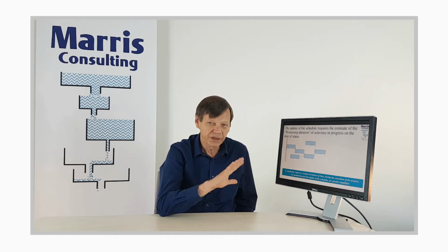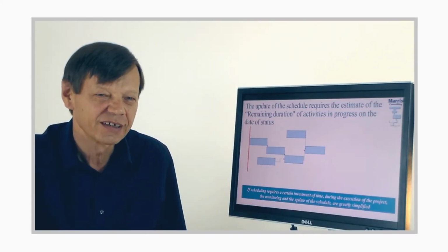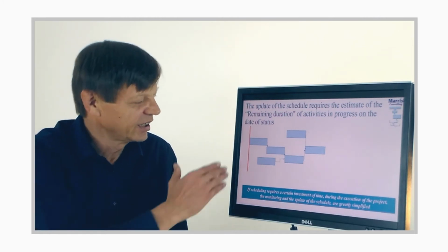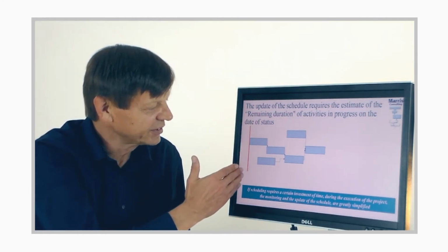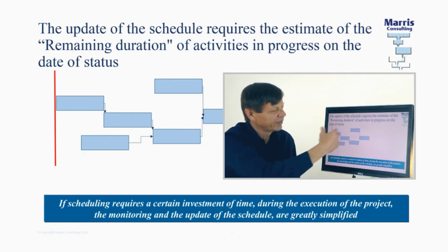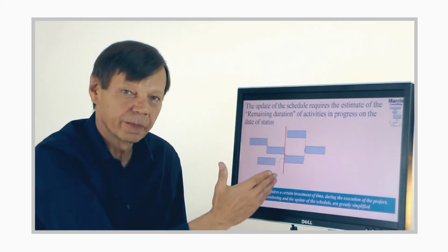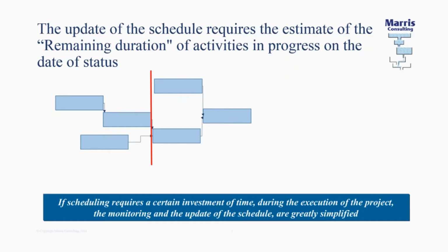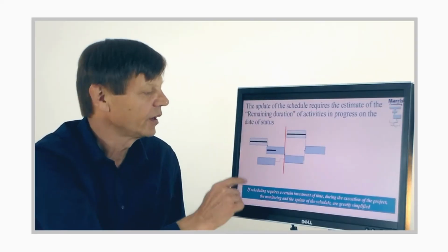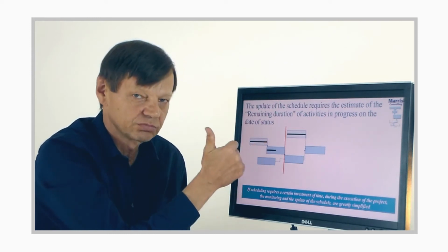Now, let's look at how you monitor the project. Excuse me if I go through a few basics, but in the strange world of projects, we need to remind ourselves of some bit of common sense. If that is the status date and that is the project, okay, it's just about to start, right? Everything's yet to be done. A little bit later, we're here, okay, and we do a status update. Where are we? This is where we wanted to be. Let's see what happened. Well, that task, it was planned in the past and it's finished.